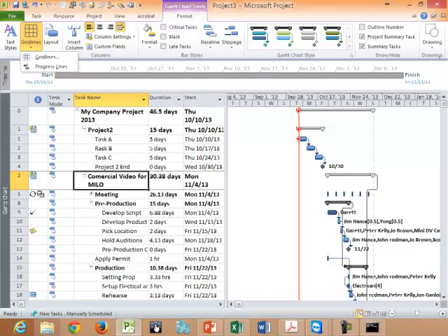This one, you can monitor the actual progress. Percentage usually is divided. You will divide accordingly. You have that formula. Remember the formula that I gave you? Duration times units equals work. Use that, based on that formula, we'll calculate.